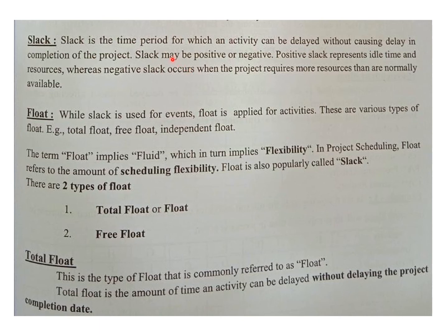Now, when it is said slack may be positive or negative, positive slack simply means that there is idle time which is available. And negative slack simply means that the project is running on a delay, so it requires more resources to finish. But normally it is used in a positive sense only.